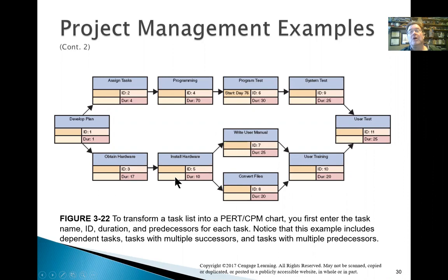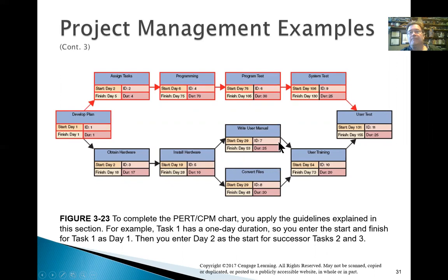And again, if you think about critical path, probably the sum here and the sum here would determine the critical path. And in all honesty, this one right there, the 70 days, that is just jumping out at me as being pretty well on the critical path, because that's nothing. I think even down here, does this even equal 70? So even these tasks down here don't even equal 70. So this is completely the critical path, and thankfully the slides agree.